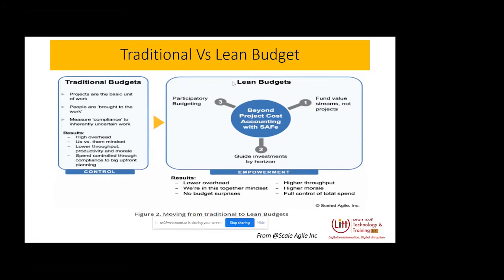So now, when we start funding a fixed PI, we need to make sure of the following. Based on the historical data from the previous waterfall model, in 3 months we spent around 30K on these teams, on all the different scrum teams. That is the assumption we need to make initially to fund the first PI, and then gradually, as we move on to the second or third PI, we will realize that every time the PI cost is between 30K and 32K.